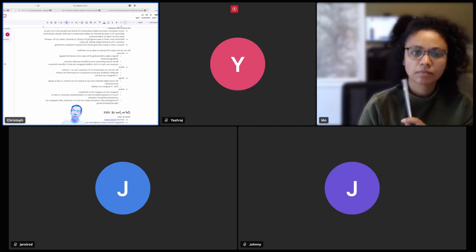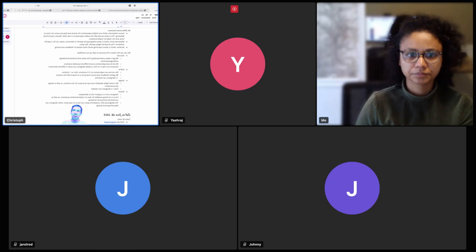So we don't have a lot of time, but maybe you can just read through it. I think initially when we explore all the possibilities for what we can do with navigation, it's good to have a whole bunch of brain power. But when it gets specific to finalizing the last little bits of details and writing a bit of documentation, it's fine if just 1 or 2 people wrap things up. But then at the end, when it's about implementing that stuff and testing it, it's helpful if more people help test the implementation another round. So I think we have an ebb and flow of design responsibilities and how many designers we actively need in the process. That'd be a good thing to be aware of too.